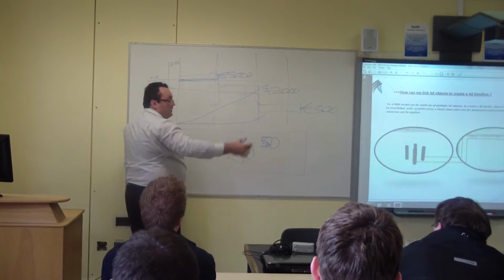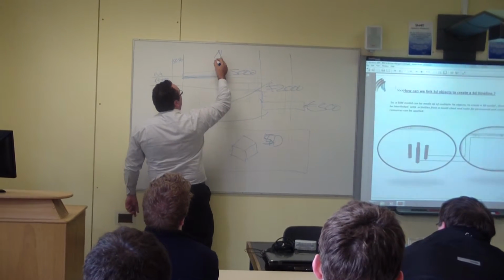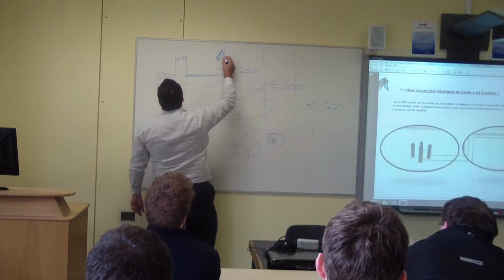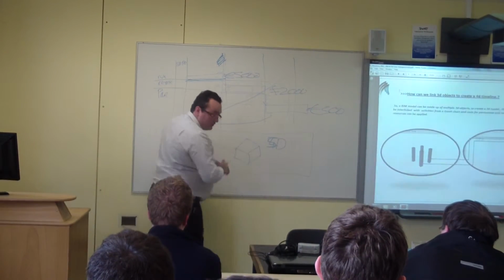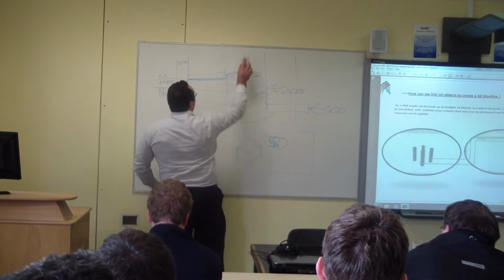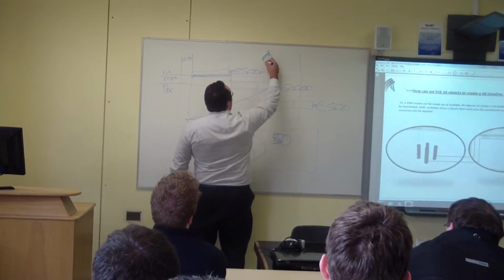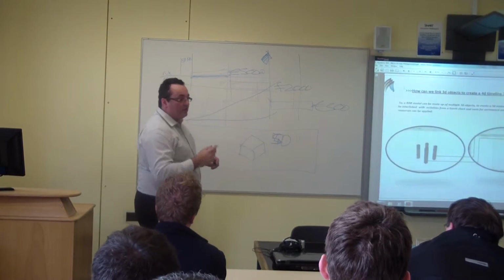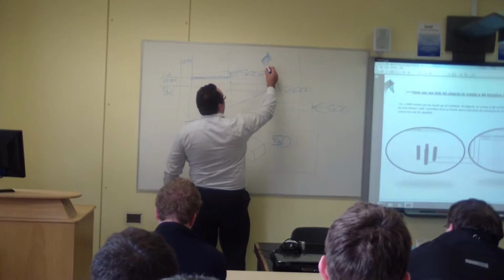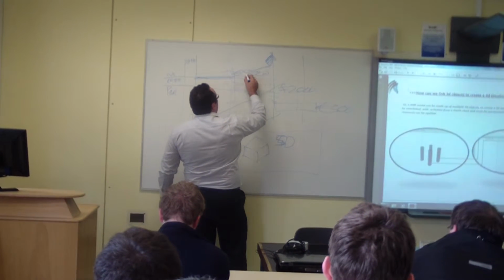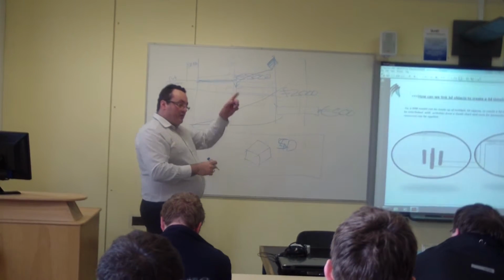Now we have the architect, and he's gone and issued something late. Put it here. We then have our rebar. Rebar's here now, and that's what you need to put on your program. It's called a milestone, and you constrain it. Then you link that milestone back over to this activity. It's very easy to do on Microsoft Project, a finish to start link.